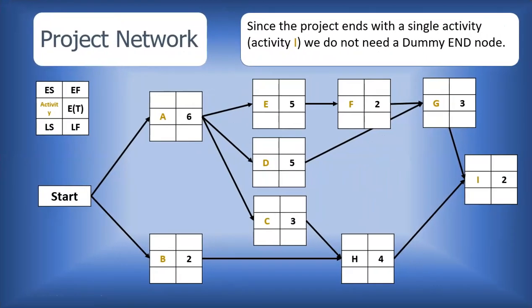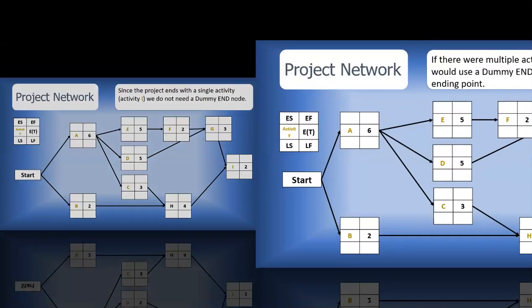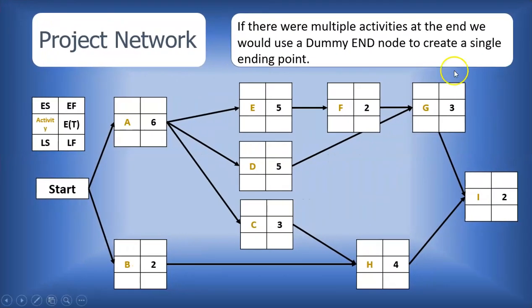Now, since the project is ending at a single point, which is activity I, we do not need a dummy end node. The dummy end node is only needed when we do not have that single ending point. If we had multiple activities at the end instead of this single ending point, then we would have needed to create a dummy end node for all the activities to culminate at that dummy end node. But in this case, all activities culminate on activity I.